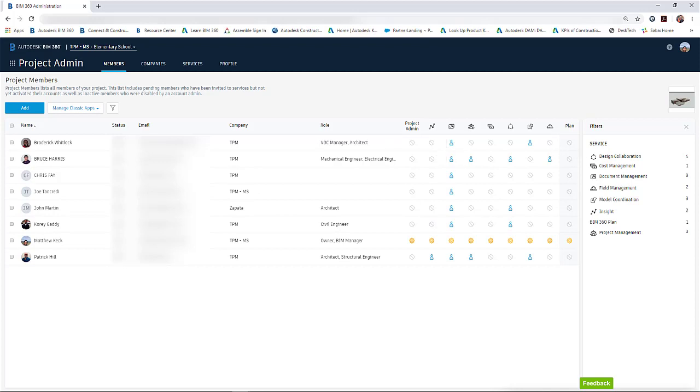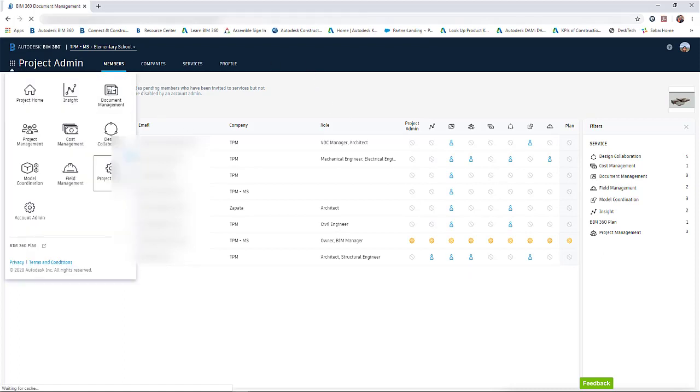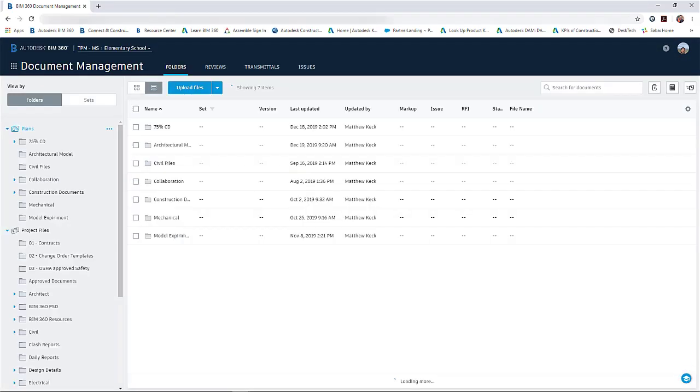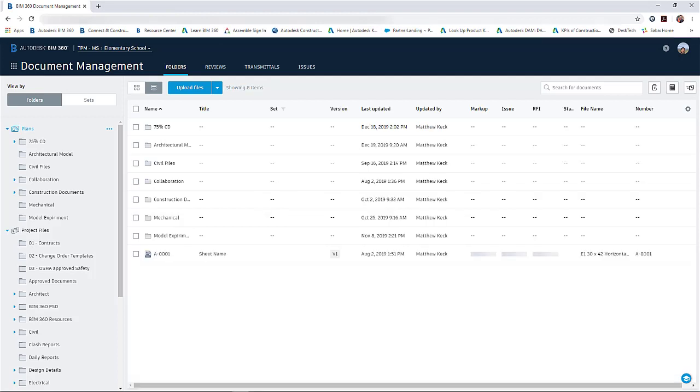After members have been granted access to the document management and given a role, further control can be applied at each folder or subfolder. It is important to note that permission granted at parent folder level will be extended to the subfolders as well.